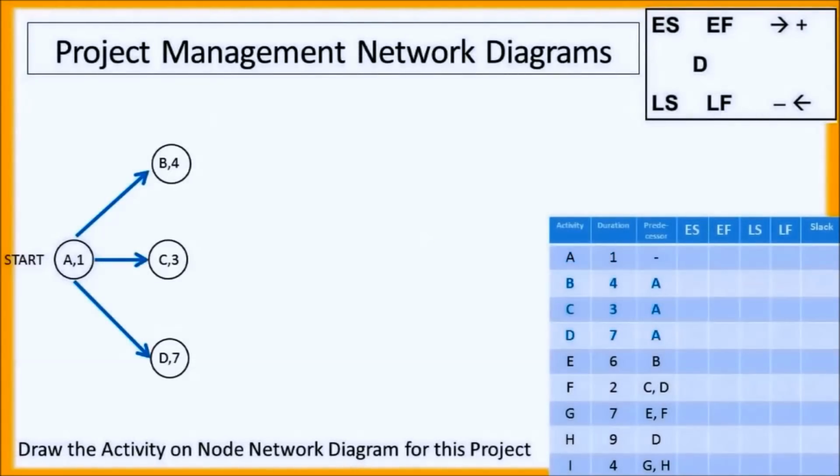So next we look in the chart for any tasks that have A as a predecessor. What this means is that after task A is complete, then these tasks may be started. In this case, there are 3 tasks that we can start after we finish task A. They aren't necessarily connected with one another, so we list them separately: task B, task C, and task D. Now let's look at task B. After completing task B, we can complete task E, because task E has B as one of its predecessors.